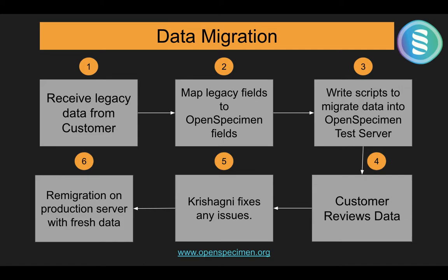With this migrated data, we will ask you to review all the data. Once you come up with some feedback, that this needs to be migrated, these are errors, this needs to be fixed in the system, this needs to be fixed in the ETL scripts, after all such feedback loops, we will finalize the ETL scripts. At the same time, we will ask you to fix any issues in your data at the source.